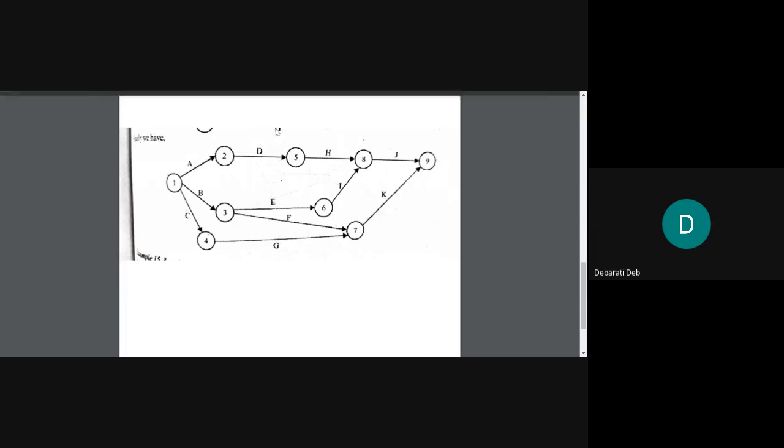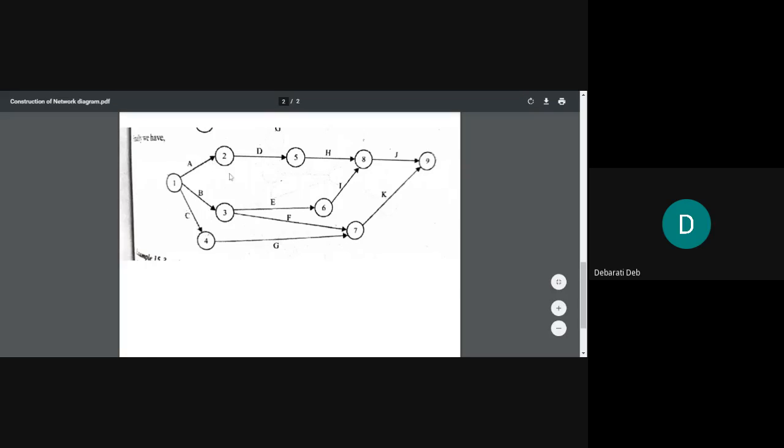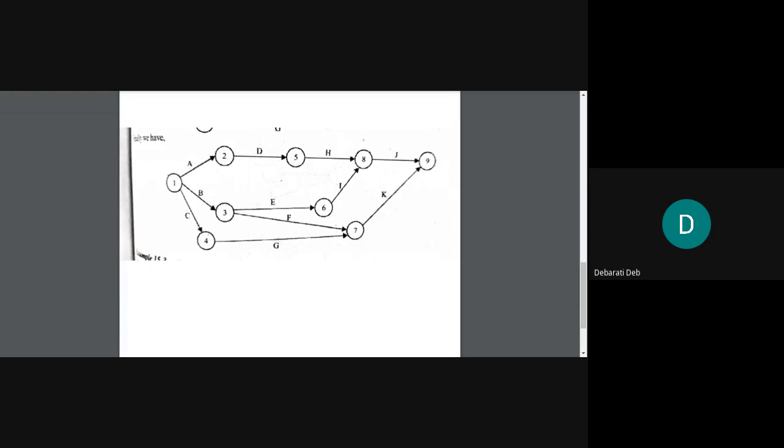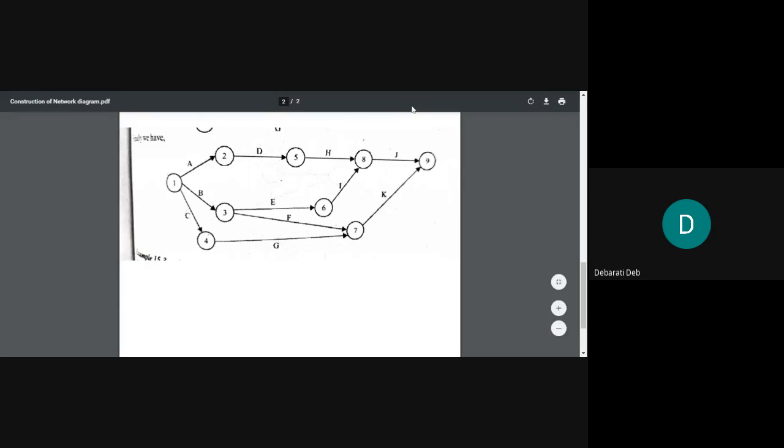And as Ashish told, A, B and C are the starting activities. So we'll draw 3 different arrows from this first event. Always draw in 3 different directions. Whatever activities are given, draw in different directions because they will also have their own successors, and if you don't draw in different directions, then you will have a messy diagram afterwards. So draw the 3 arrows A, B and C.